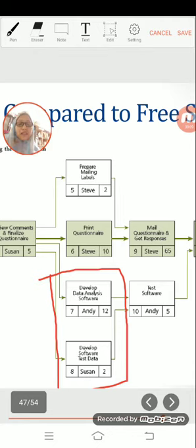So from day 10 until day 12 activity 8 can start, but cannot be later than 12 days. Because activity 7, develop data analytics software, only needs 12 days to finish, but develop software test data only needs 2 days to finish. Therefore activity number 8 has 10 free slack days.